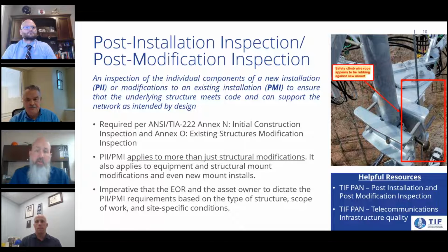Yeah, and from a contractor standpoint, the PMI and the PII process, when we engage with the EOR, the asset owners and the end users, really allows us to close out a site and know that all the documentation that we've provided is good. We've checked all of our boxes, and it can actually reduce the need for a retrip, since we're engaging with all the parties that set the criteria for the PMI or the PII.